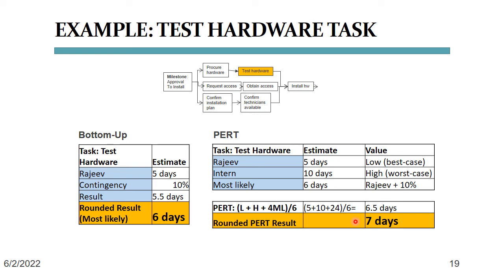Going back to the number that we received from Rajiv, generally Pert results end up moving the final estimate towards the worst case, since the worst case value tends to be further out from the most likely than the optimistic number. This is where estimating becomes more than a numbers game.